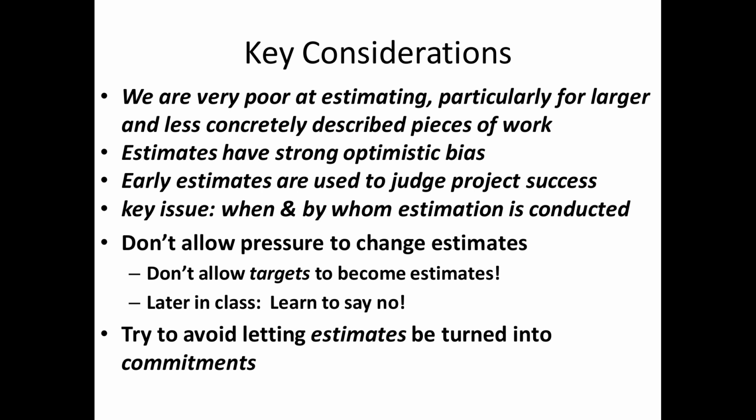So be aware that early estimates that you give can be used against you later. And that's why it's especially dangerous to have a strong optimistic bias, because you're setting yourself up for a situation where your work could be viewed unfairly just because your estimate was overly optimistic originally. And you need to resist pressure to change estimates from those who are not involved in doing the calculations needed to come up with them, and avoid letting estimates be turned into commitments.